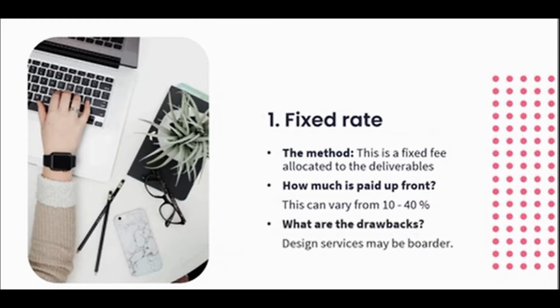Then what are the drawbacks for this fixed rate method or design fee structure method? The only drawback for this method of payment or for service is that the scope of works may end up being broader than expected, and the designer may end up spending more time and energy to complete the job with some small losses. But this is about it. Otherwise, it's a really nice method of payment to use.